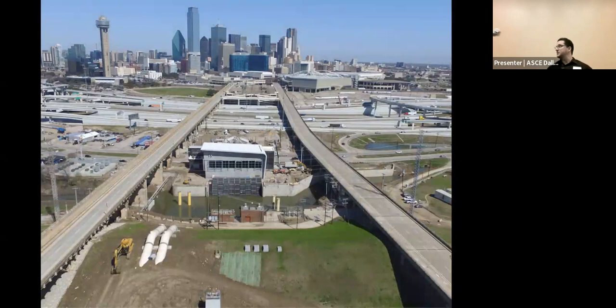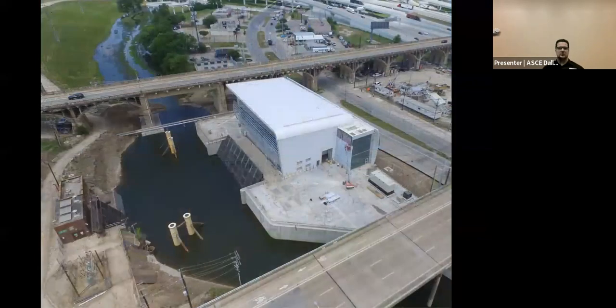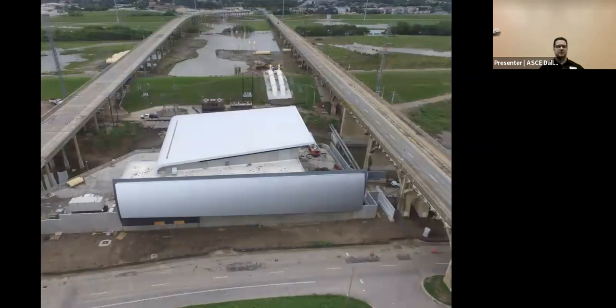Right during the pump testing, you can see all the risers on both sides. What the contractor proposed, and it worked out better, is you're able to test both pumps. You have 9 and 10 was first, and then 8 and 7 went in. But they're able to test the pumps like this without having discharge piping for 8 and 7 go in. So they were able to get those pumps tested sooner that way than having to get the discharge piping in fully on the next piece.